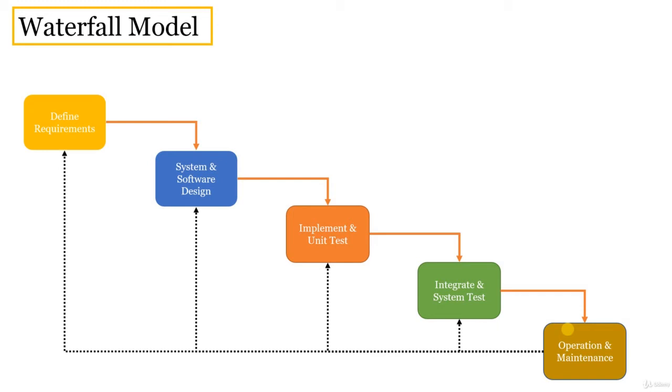So when you are going to use the waterfall model, in principle, the waterfall model should only be applied when requirements are well understood and unlikely to change radically during the development. And this model has a relatively rigid structure which makes it relatively hard to accommodate change when the process is underway. So, you know, the waterfall model was used heavily when IT as a process started.